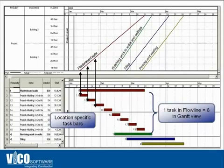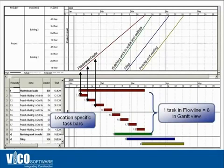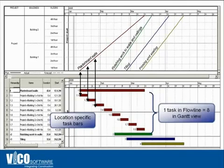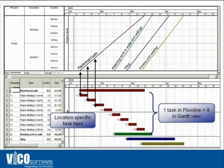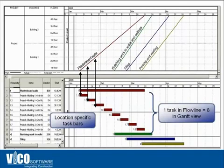In the Gantt chart view, for every single location in an activity-based schedule, you have to create a separate task and activity — for example, plastering or drywall on the first floor, second floor, and so on up to the eighth floor. Every single activity for each location is a different bar in the Gantt chart view. In the Flowline view, however, you only have one line representing one crew — the drywall crew — across several locations. So instead of eight tasks, you only have one that you need to manipulate and define.